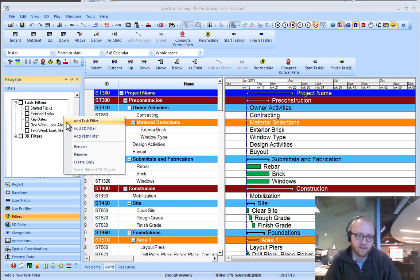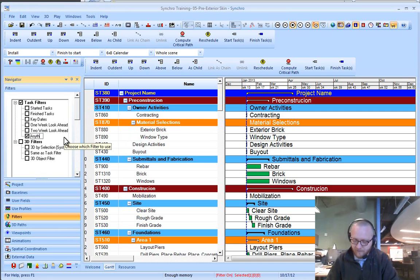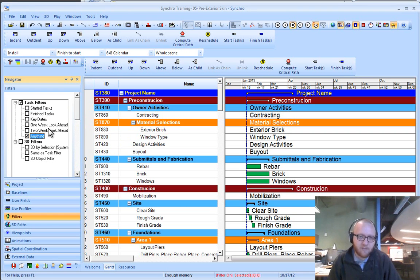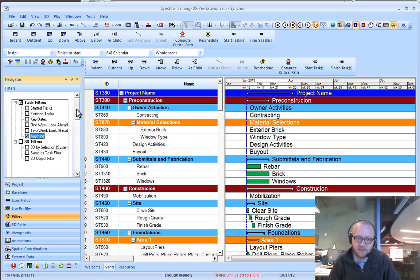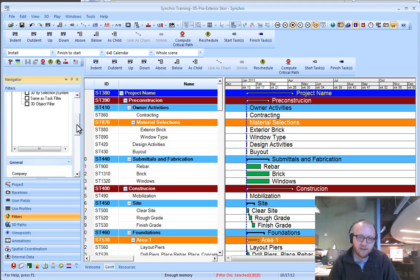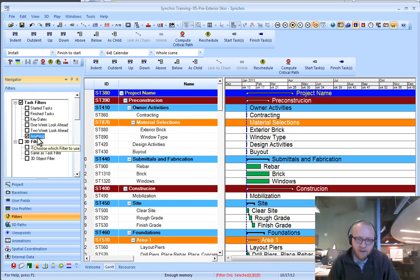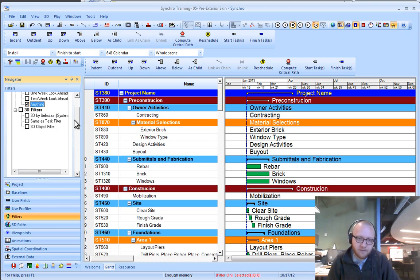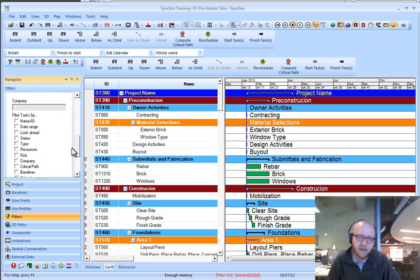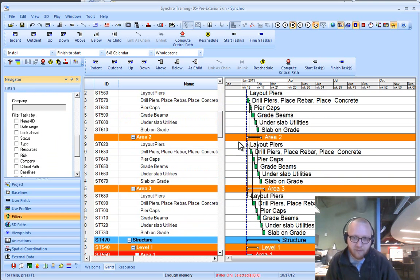To add a new filter, I click anywhere up here in the white space and say add task filter. I can name this anything. The name is only so you know which box to click on. This has a 2 week look ahead, but that could, in the options, be a 4 week look ahead. It's really just so you know what to click on. We control the content of that filter by coming down to the bottom. It's important to note that this box is checked automatically, and that'll come in important here soon. I scroll down with my anything filter, and I'm going to be filtering tasks by the name of the task that I'm looking for.